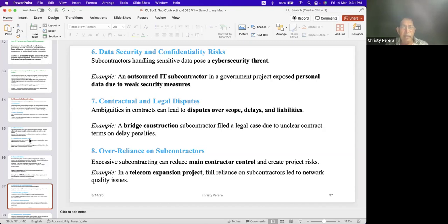This is not happening, but if the procurement entity made a mistake, if he doesn't mention exactly that you can't do more than 20% subcontracts in the bidding document, the main contractor can subcontract everything to others. Then it's a real problem.